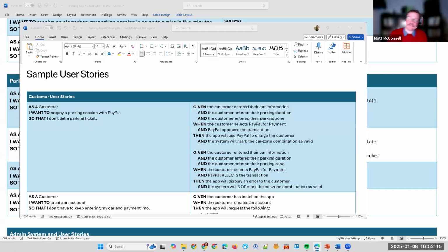Yeah, it's a good question. If your work item is a black box of some kind where data comes in, data goes out, or there's a precondition, there are business rules that govern what happens when a trigger event occurs, and then there's an after effect to it, those are the ideal things where you'll use given, when, then. I've seen some other business analysts and product owners just try to use this for everything, and the dev team will have a development task, like stand up a database, install the certs, stand up the server, those kinds of things where it's really cut and dry and it's not something that you're going to write an automated test for. You're wasting your time with acceptance criteria, and then you'll just get kind of soured on the whole process and stop using them altogether. So use it where it makes sense.